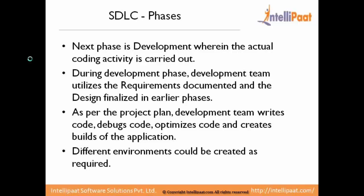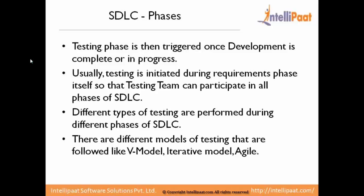Next comes the testing phase. It is not necessary that testing should come only after development is completed — testing is triggered once development is complete or in progress. Once development is in progress, testing is also triggered once requirements are finalized, so the testing team can contribute during the requirements phase, during design, and when code is written. There is testing team involvement throughout all phases of the SDLC.